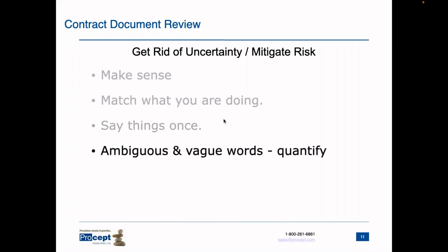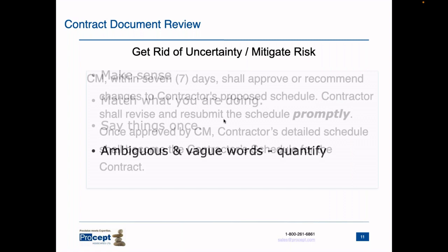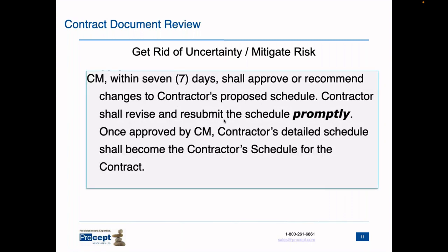Contract wording should be black and white. When people don't know what to do, they put in ambiguous words or vague statements, which causes problems in the field about what was meant and what the contractor bid on. For example, the word 'promptly' means different things to different people — is it three days or six days? There is no scheduled delay defined for 'promptly.' If you want a document back in three days, say so. Before signing the contract, discuss it with the contractor and come to an agreement if there are differences. Another ambiguous phrase is 'ASAP' — always quantify what you need.